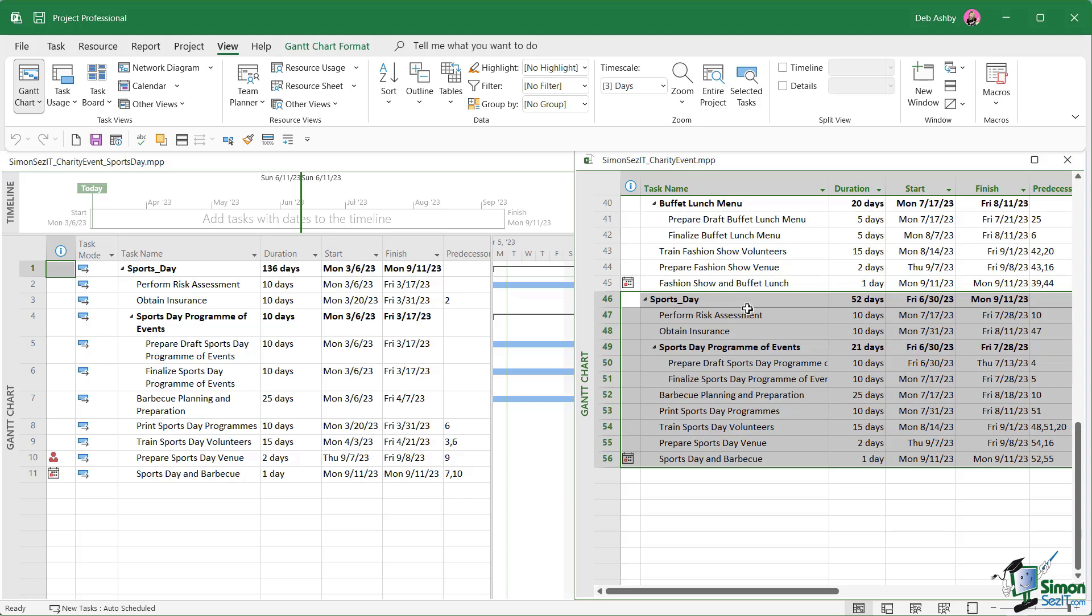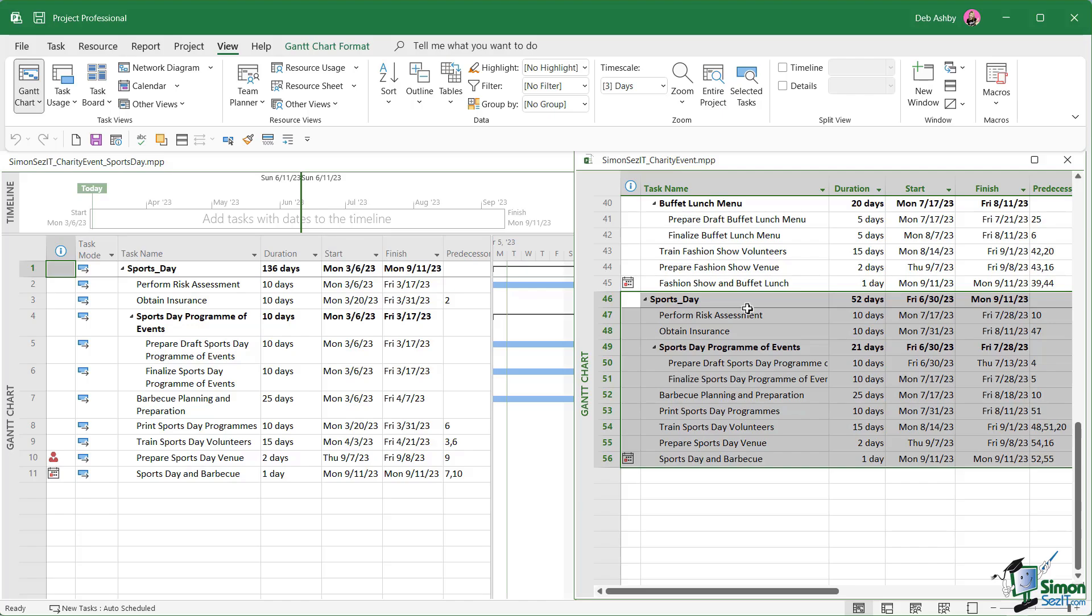The key aspects here when it comes to setting up a resource pool is that we basically set up a brand new project with resources, but no tasks. Really, if this is something that you want to do, you want to try and do this at the outset of the project. What many people will do is they'll start off with an empty MPP file, enter the resources, make up the resource pool and save the project, but with no tasks.